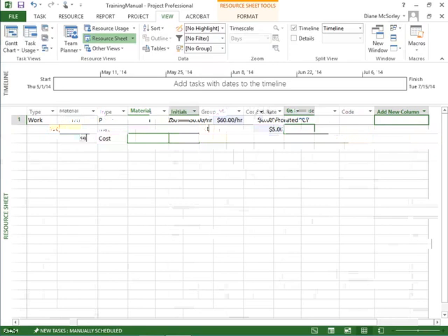And then budget. Yes, if you plan on using this to help you compare your actuals to your budget, your plan to your budget, we need to put the budget in. And what we do is we will put in a budget line item for labor, for materials, for costs. And by adding it as a resource, we can assign a value to budget later. And then when we run reports, we can compare the budget to the actual, the budget to the plan, and we can see where we fall.